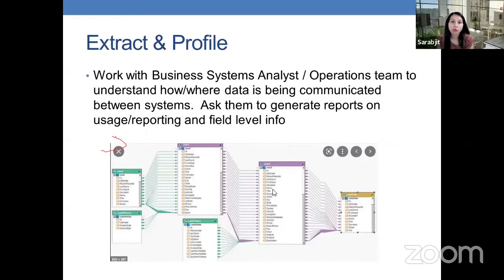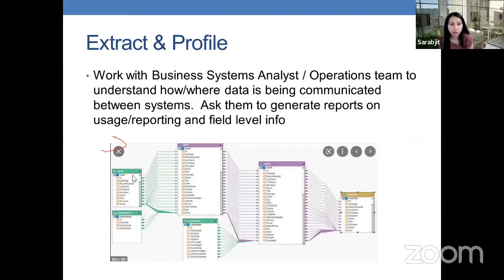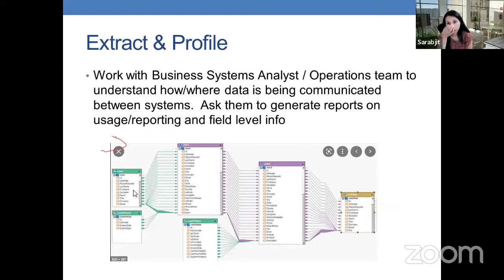In the extract and profile phase, we work with business systems analysts or data analysts on the project to understand how and where the data is being communicated between systems. Just because we have a huge database doesn't mean that database is only used for one system. Oftentimes, we have lots of systems talking to one another to make sure that the end product works. Your systems analysts or operations teams should be able to gather and give that information to you, including batch jobs that may be running and where all the downstream data is going.